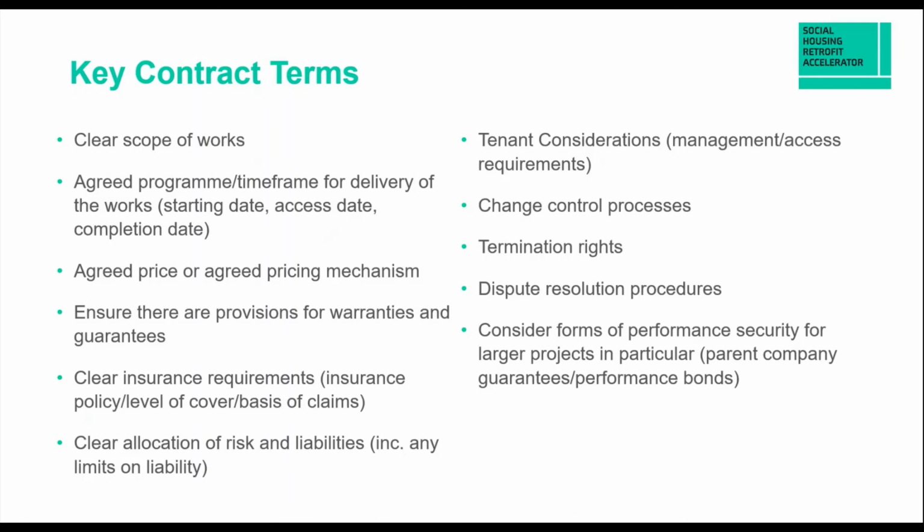And then finally, considering forms of performance security for larger projects in particular. So that could be by way of parent company guarantees and performance bonds. But as I said, probably for larger projects, these might not be needed for more simpler, low value projects.